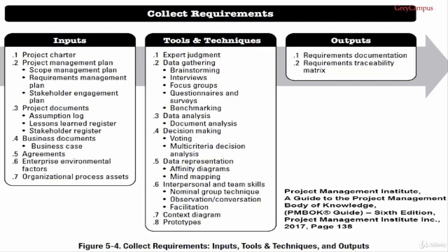Next one is number 7, facilitation. Facilitation is used with focus sessions which bring key stakeholders together to define product requirements. Workshops can be used to quickly define cross-functional requirements and to reconcile stakeholder differences. Because of their interactive group nature, well-facilitated sessions can build trust, foster relationships and improve communication amongst the participants, which can lead to increased stakeholder consensus. In addition, issues can be discovered earlier and resolved more quickly than in individual sessions. And that's from the PMBOK guide, page 145.